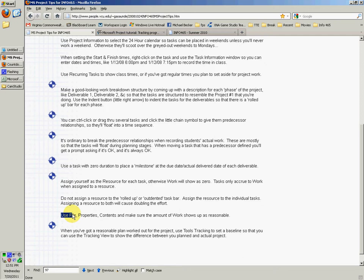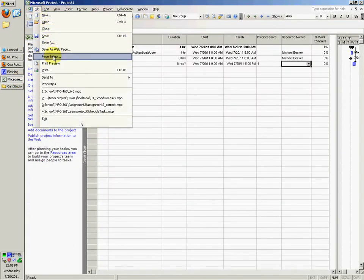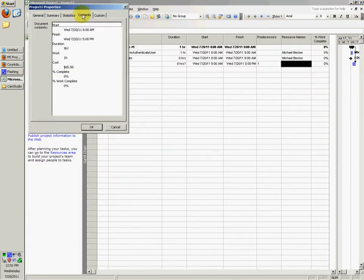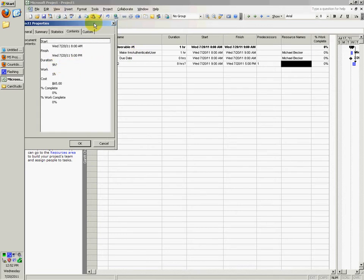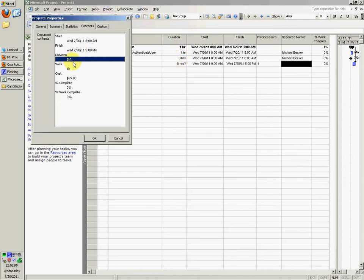Next thing he says to do is use File, Properties, Contents, and make sure the amount of work shows up as reasonable. So File, Properties, Contents, and you want to just make sure that the amount of work there is reasonable. Right here it all adds up to about 9 hours total, and that's the 9 hours there, and just make sure that it's reasonable.